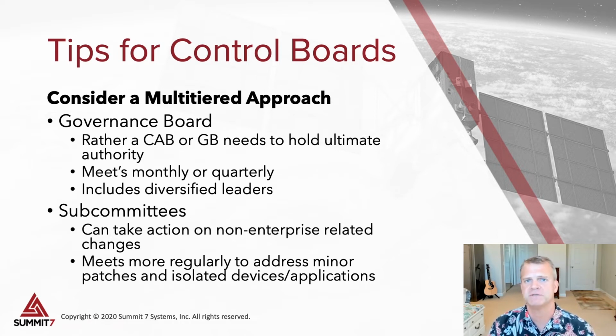You have a group of developers. If a change request comes in, the developer team looks at it and says, this does not need to go in front of the governance board. We can approve it and we'll notify the board of the change. Same with IT pro or administrator patches. And if it's routine stuff that doesn't affect the entire platform, that group can approve it with a manager involved, and only the governance board is notified. I found this kind of two-tiered approach to work really well, so your change management remains agile, yet the important things are caught by the governance board, and you're documenting everything.